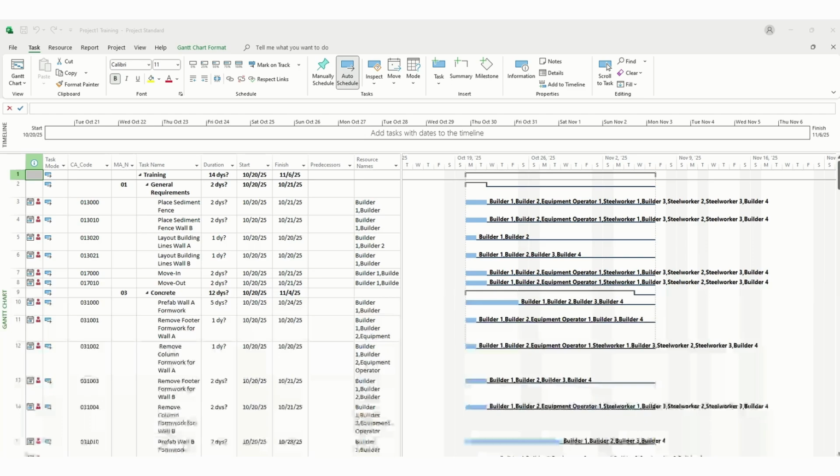As a regiment, as a group, we want you to always keep your original dates that you put as required, and the date you complete it to be actually when you completed it, and then just put a note why it took so long to complete. This will help us with training, manning, and equipping to see what the groups and regiments can help with as far as getting the support you needed or the resources your battalion needs to plan efficiently. All right, you close that.